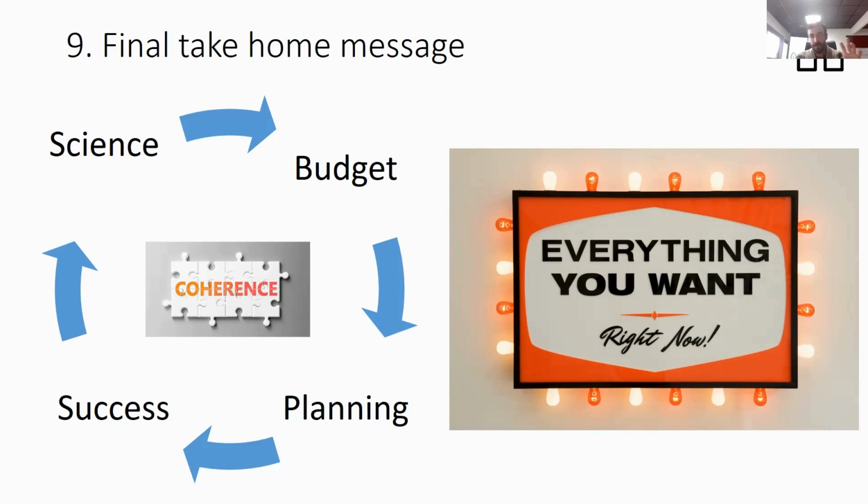Write a summary: scientifically, I want to do that. Then how I am going to do that will be the planning and the Gantt chart. And the planning and the Gantt chart will give you your budget. And when your budget is clear, then you can go on and write everything in detail. And I hope that if you do that, it will improve your success ratio.